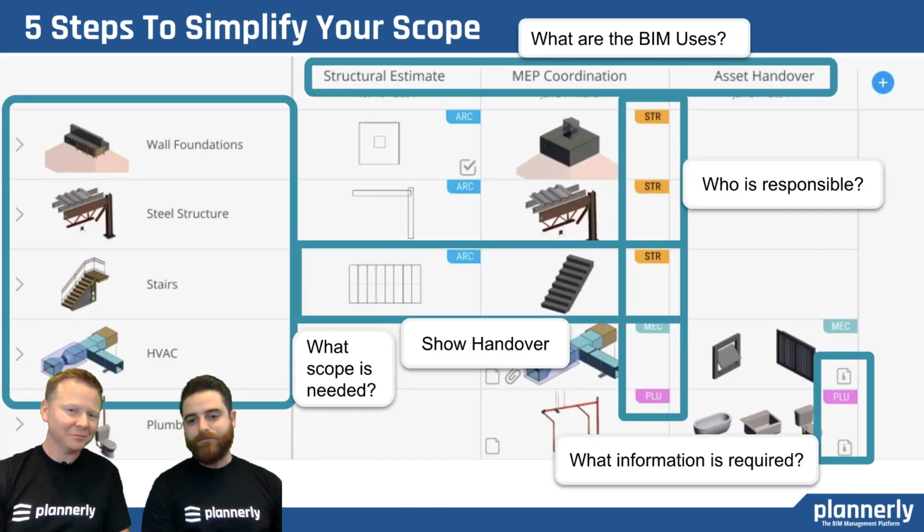Yeah, and another example that I needed to share was an owner who would always work with the same contractor, and they've been spending lots of time providing information for almost every component in a model. But when they sat down with them and actually asked them what information is important to some specific elements, they ended up having a 45-minute conversation on the exact scope that they needed, and they started saving hours of time in all of their future projects because they minimized it to 17 parameters, and instead of thousands, to only a few dozen equipment that they were really interested in having at the handover anyway.